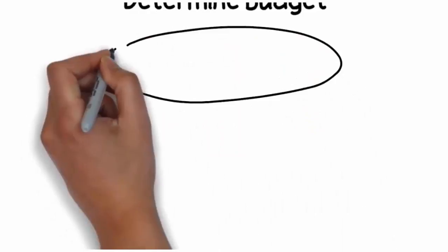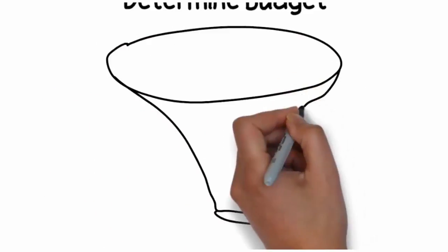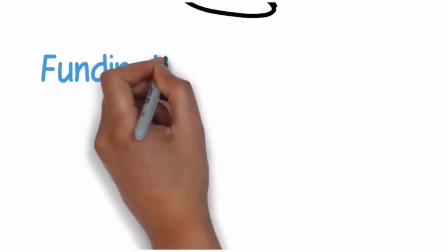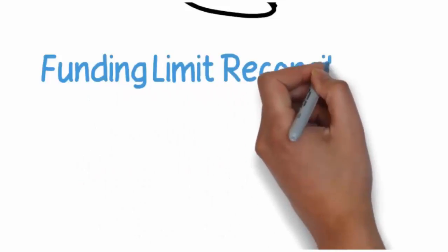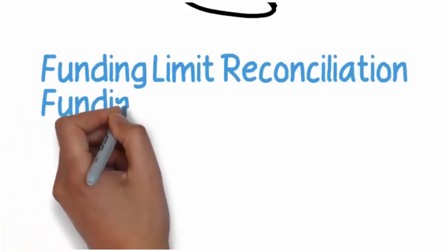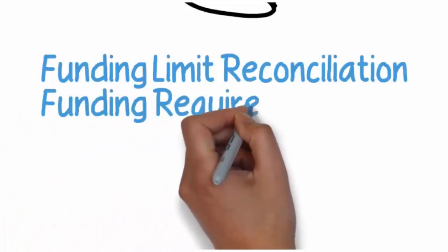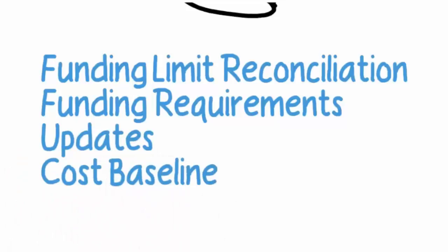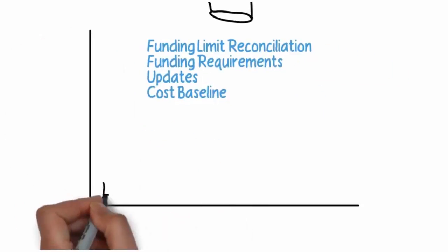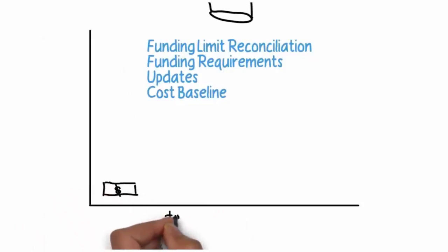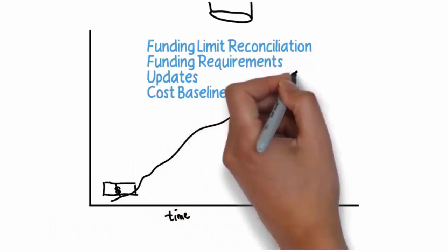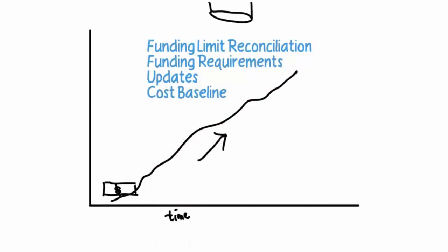From there, we take those estimates and determine a budget, which is essentially an aggregation or update of those estimates. The outputs from that process are going to be a funding limit reconciliation and other funding requirements we may need. Of course, there's also a cost baseline — how we're going to use that money over the course of time — using both our costs and what we've got from time management, based on what work we think is going to be used and how it will be spent over that time.